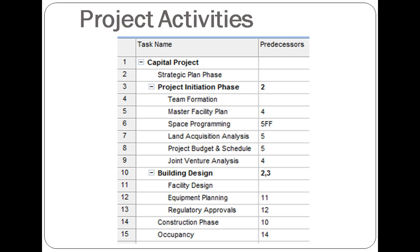Take particular note of row 6. The predecessor 5FF is entered here because the subtask space programming must finish at the same time as the master facility plan.